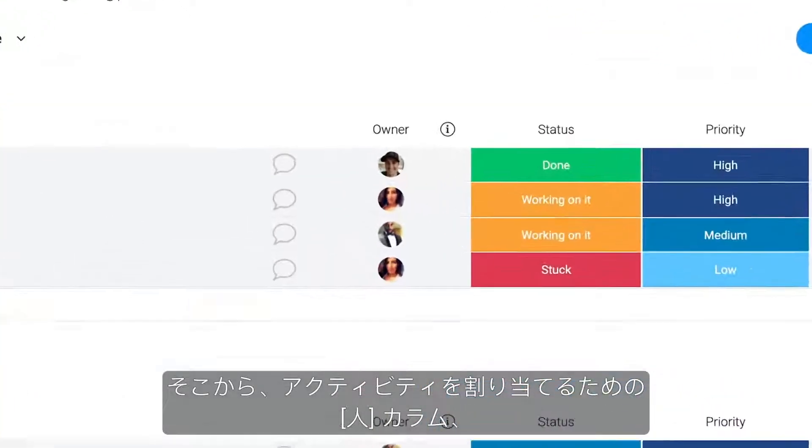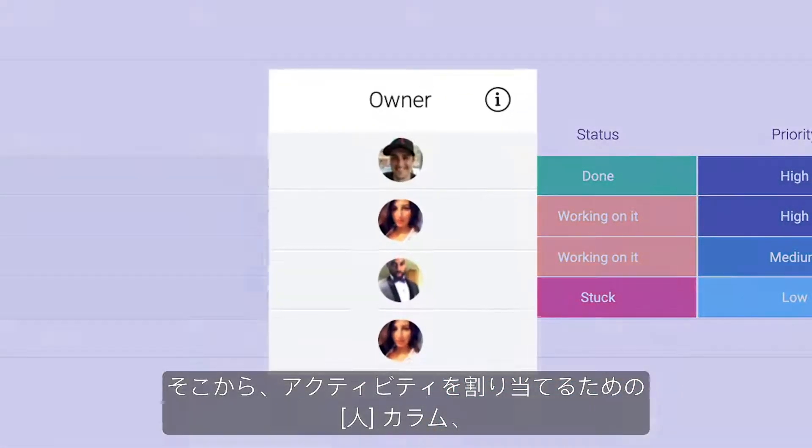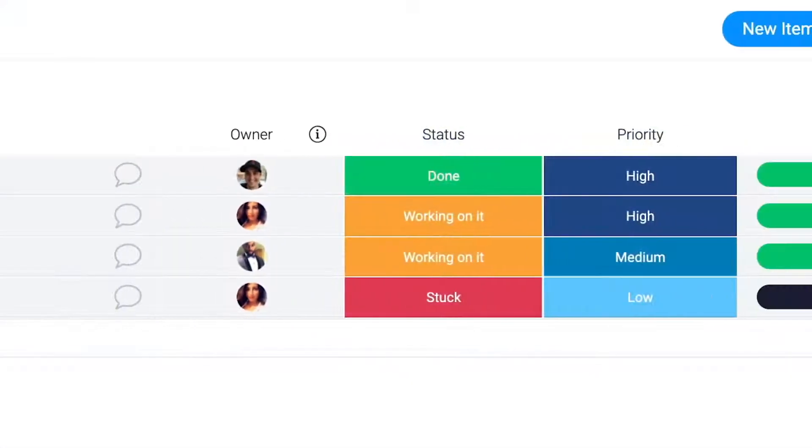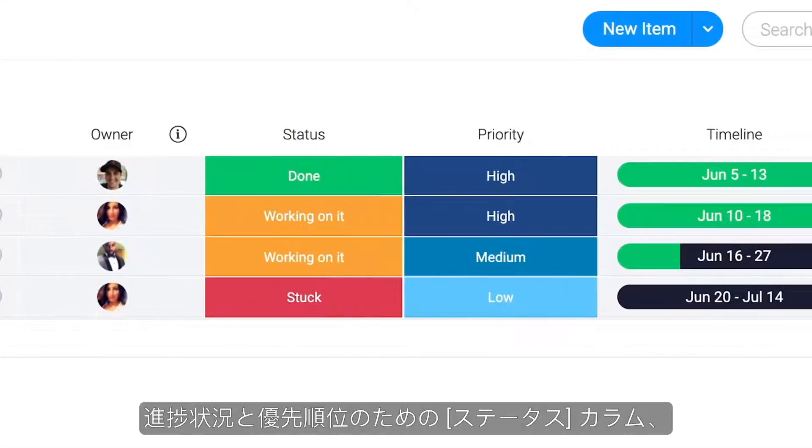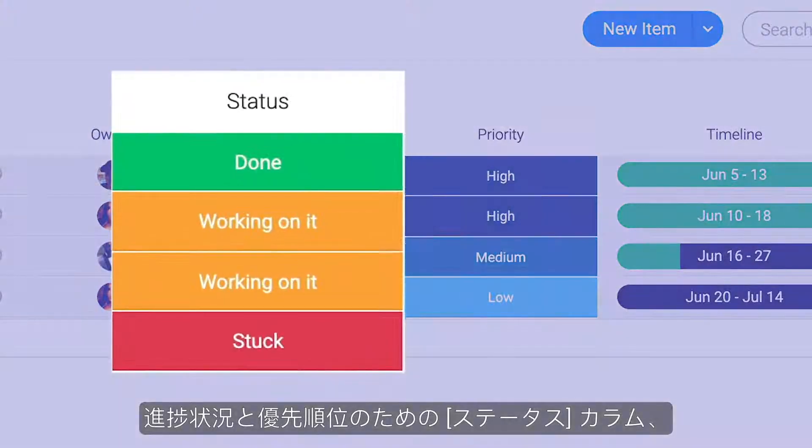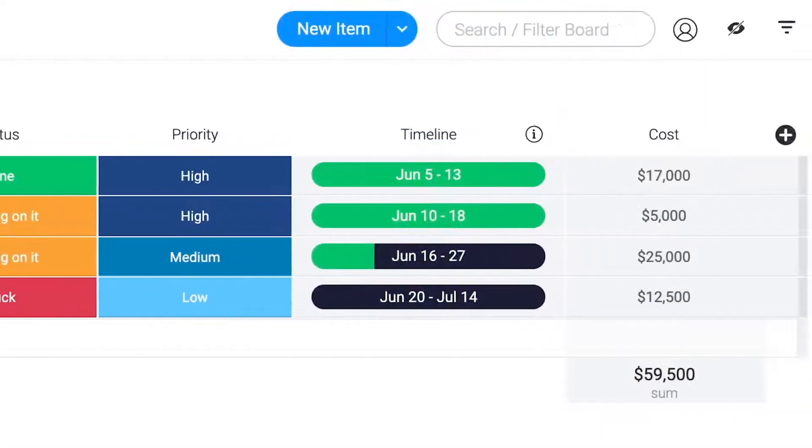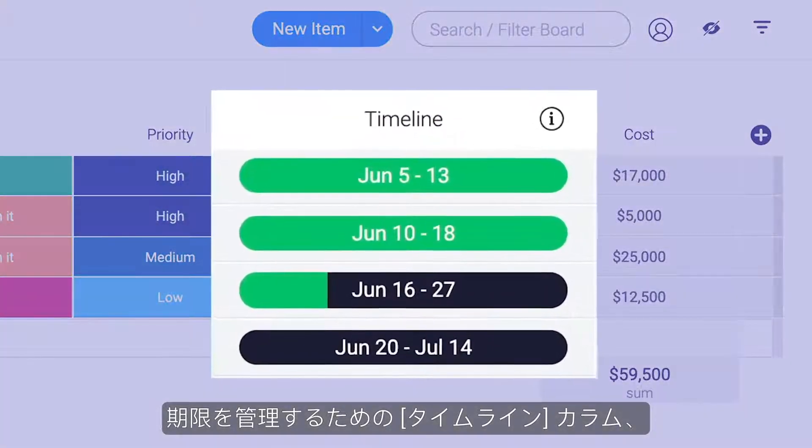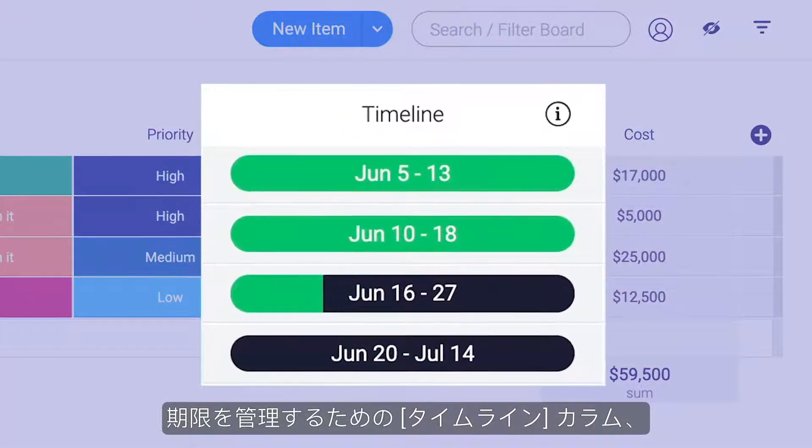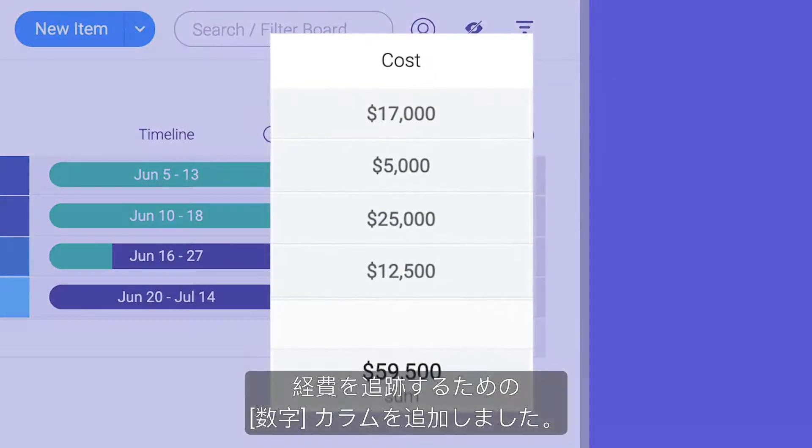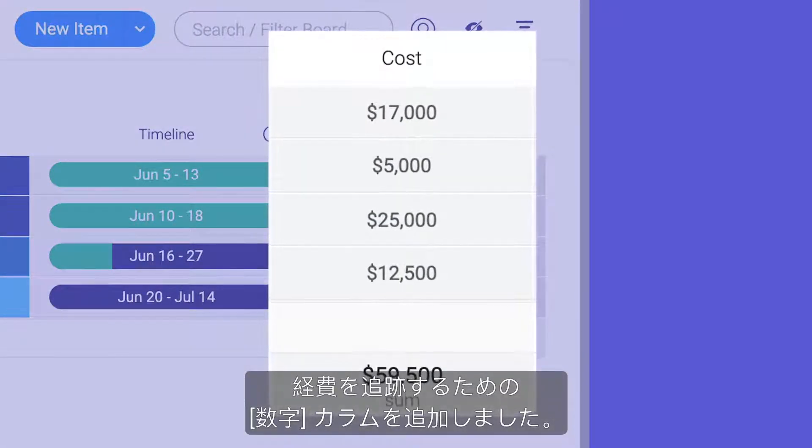From there, we've added a people column for assigning activities, status columns for progress and priority, a timeline column to manage deadlines, and a numbers column for tracking expenses.